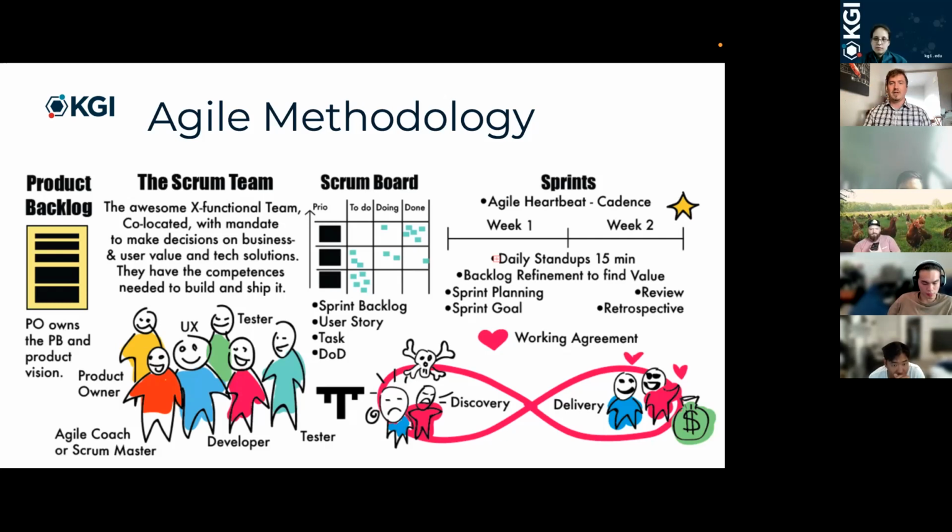In your case, the cadence that you will see will be these stand-ups. Because you're not full-time employees, instead of daily, it'll be weekly or bi-weekly. So that'll be your heartbeat within a sprint, having those meetings where you're all getting on the same page. You know who's doing what, the to do, the doing, the done. You're making sure everything's moving to the right, so that you can get the MVP out by the end of the class.